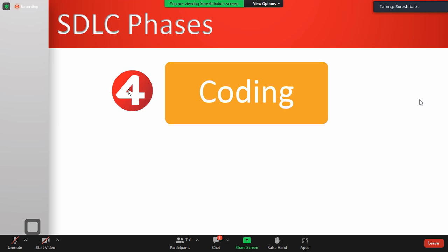Finally, after you deliver the product to the customer, they will also do a small check on whether the delivered application is ready to go for the business or not. If the customer is happy with the delivered product, yes, it is usable for my business, now he will make the due payment and give the acceptance. Now the project enters the maintenance phase. What do you mean by maintenance? At the time of getting a project from the customer, or management committee, for the first 1 year we provide free support. Thereafter, if you want any changes, we do them with a commercial agreement. That is called maintenance.